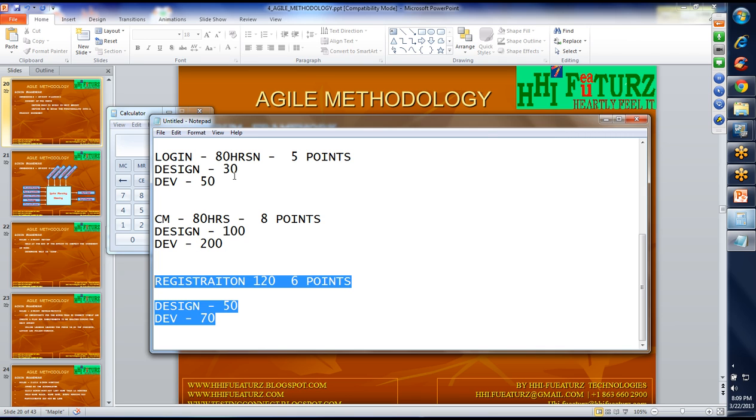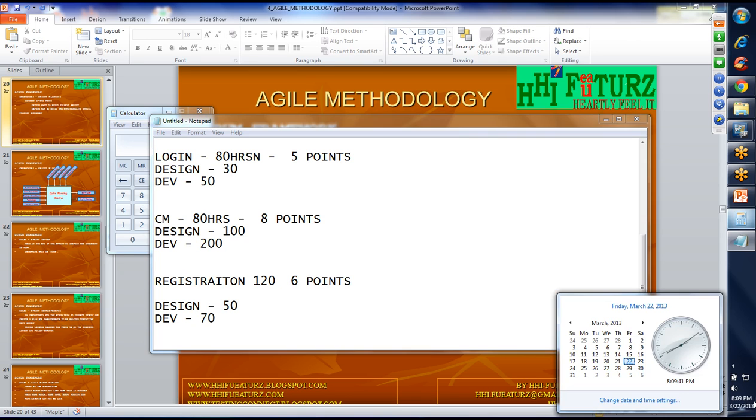So login. This is 4 weeks if we take. Let us suppose you are in the fourth, so fourth you are planning. So login is 80 hours, right? So 80 hours means how many days? Per day, for 5 resources, 5 into 6 is 30 hours. So 30 plus 50, that means mostly you can request deployment for sixth, right?